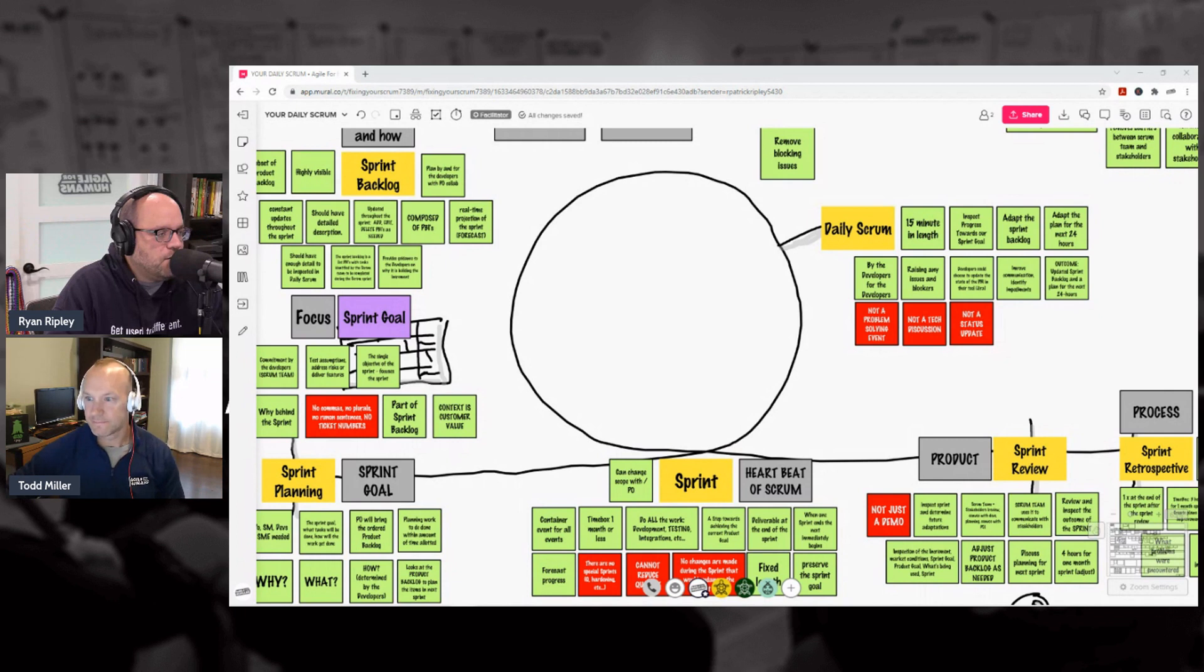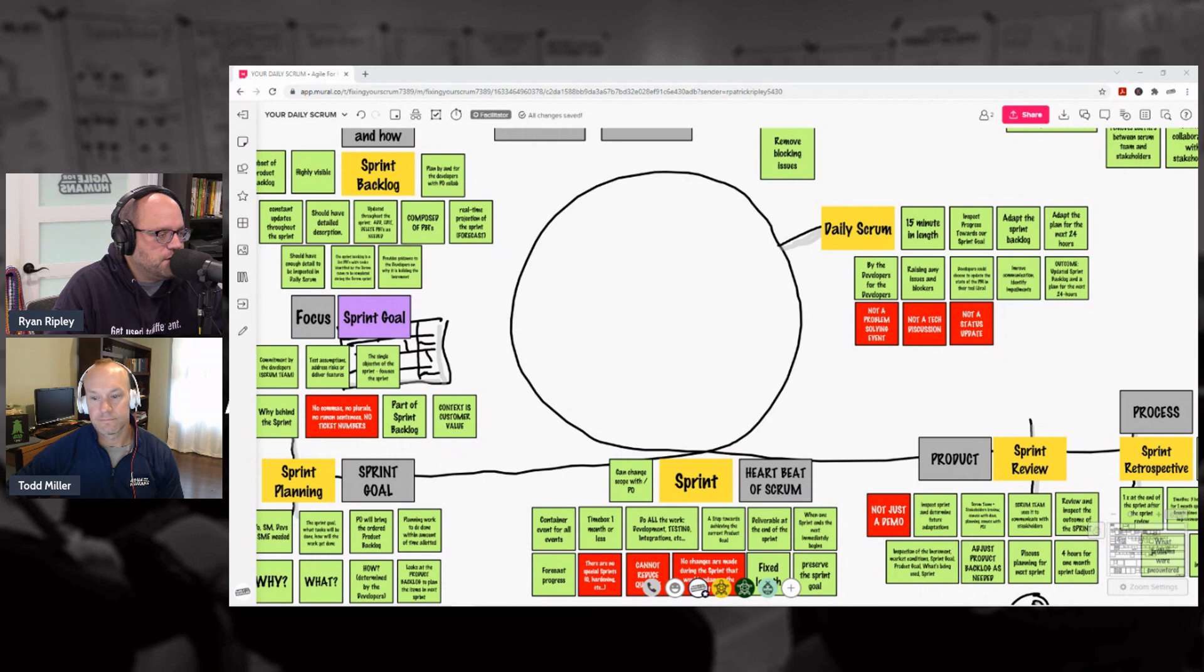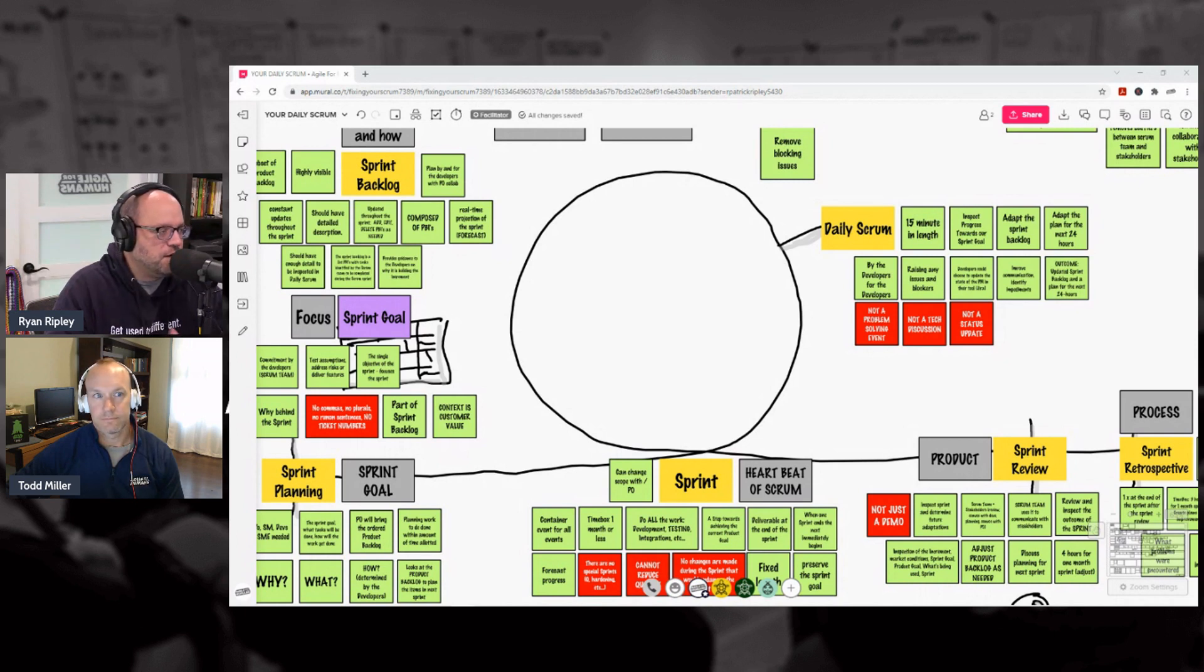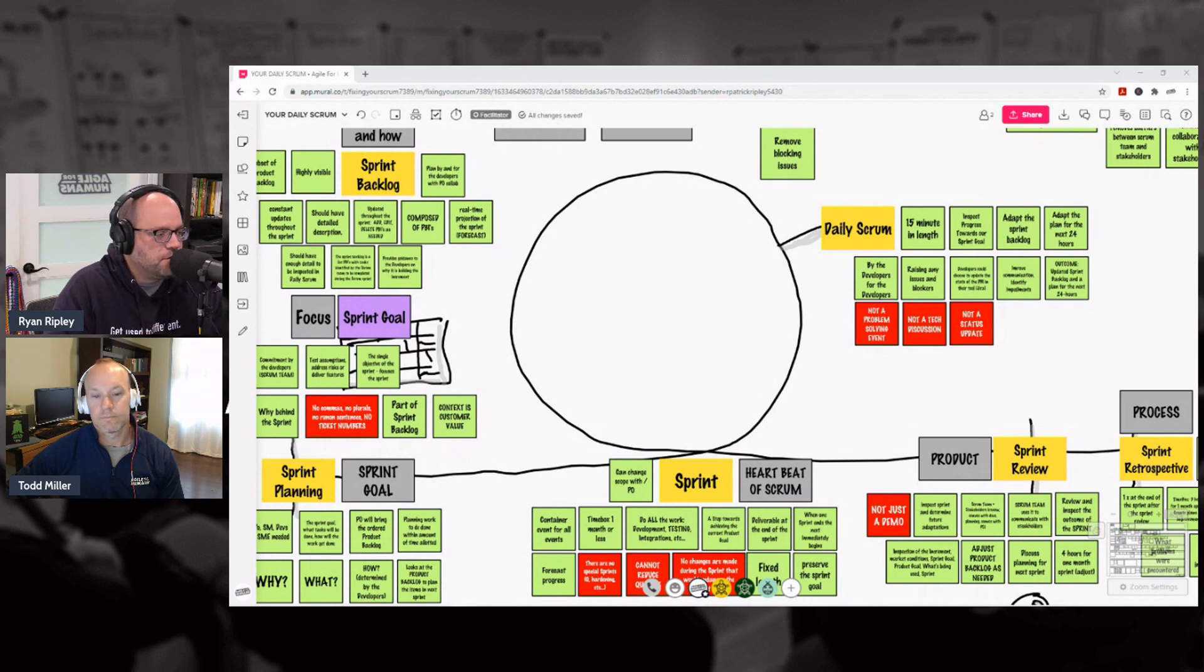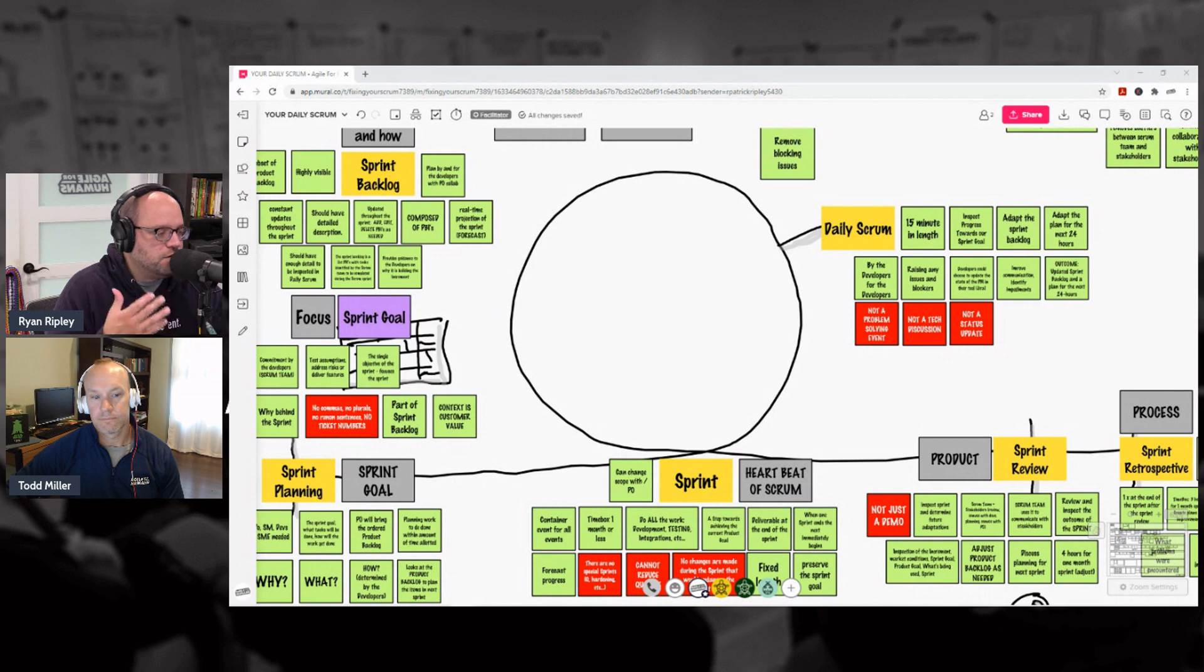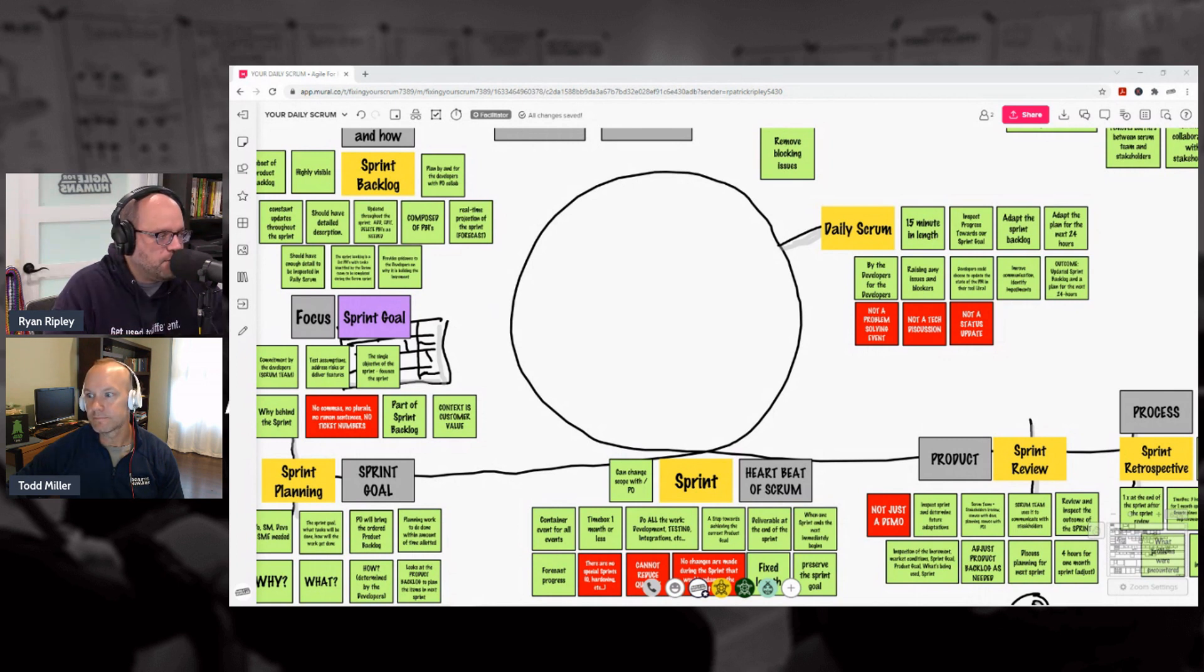It's all for the devs to figure out where they're at, where they're going, and how they're going to work together to actually get there. Fifteen minutes every day. It's not a status meeting, it's not a standup, it's not a problem-solving meeting. It is a planning meeting by and for the devs.